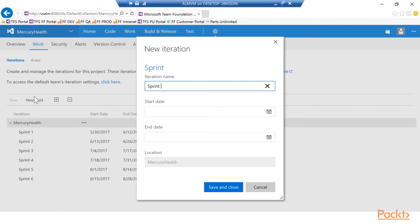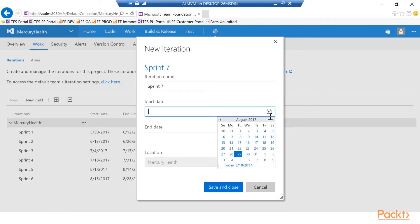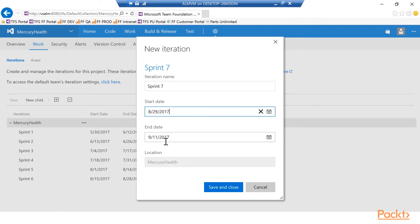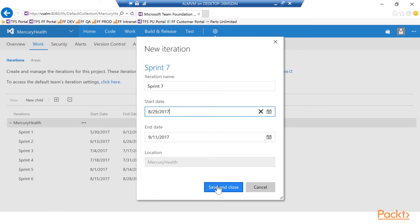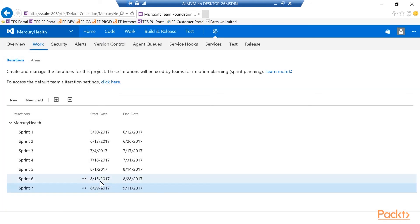I'm going to select Mercury Health and add a new child — basically create a new sprint. We'll call this Sprint 7 and set the dates. You'll notice the start date picks up from the last date in Sprint 6. Since Sprint 6 ended on 8/28, Sprint 7 automatically gets a start date of 8/29. It will also pre-populate the end date because it already knows how many weeks you're working in your sprints. That saves a lot of time — just save and close, and the new sprint is set up.